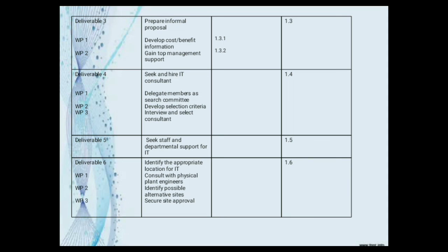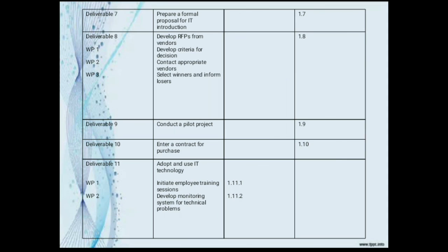The WBS also provides numeric codes for each activity. The assigned code for each activity aids in allocating cost more accurately, tracking activities that are over or under budget, and maintaining financial control of the development process. Please take a look at the example of WBS for an IT project.